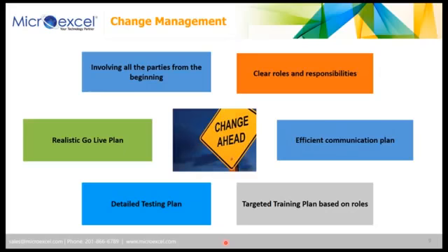Of course, it's important to have clear roles and responsibilities. With the new system, certain roles will change. The way I was doing it before is changing. Tomorrow it's going to be different. And that's something important to be prepared for, in order to later deliver the right training, which has to be planned based on the roles. You're not going to train a manager the way you train an employee, or the way you train an HR business partner or HR administrator. So that's something you really have to look into in very detail.